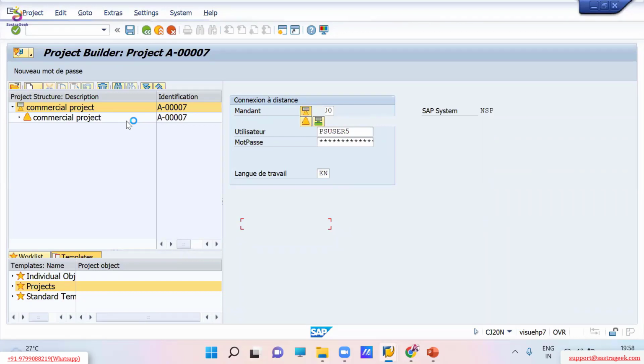But from the perspective of building the logic, to trigger an email after completing a particular activity, we maintain all the partners at project definition level so that it is easy to give the logic to the ABAPer technical team: just go to project definition level, check the partners and send an email to this person. So for simplicity, we maintain partners at project level, but it varies case to case. I'll show you at WBS once it is done.